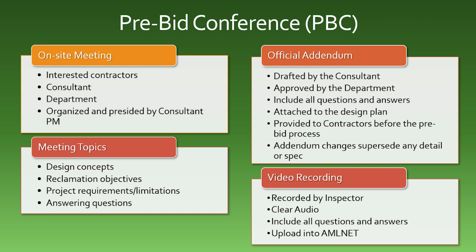design plan. Inspectors are responsible for attending, videotaping, and ensuring all contractors have signed into the pre-bid conference. All recordings must have clear audio, and all questions and answers must be recorded. The recordings must be uploaded onto AML-Net within 48 hours.